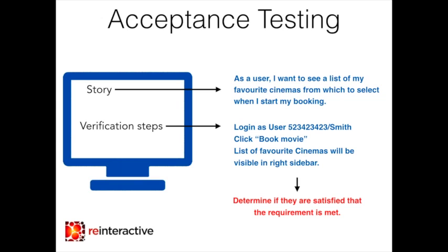As I mentioned, at the end of each story, when a developer finishes a story, they prepare the story to be either accepted or rejected. And what they will do is document inside the story how the project owner is expected to test the story to verify that they've implemented that requirement or feature correctly.